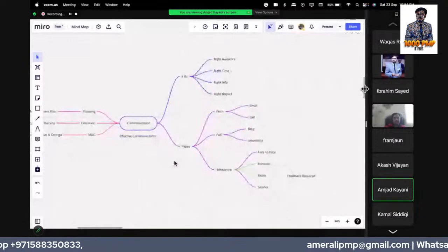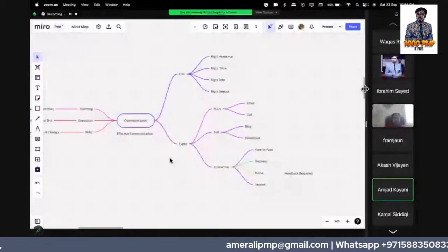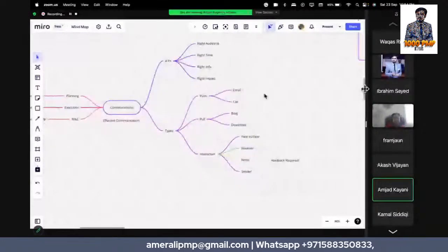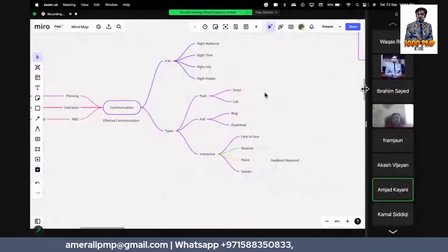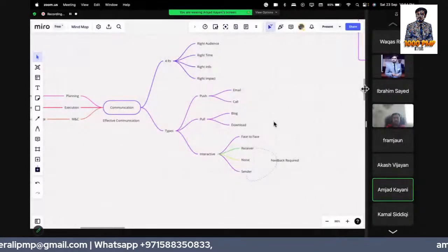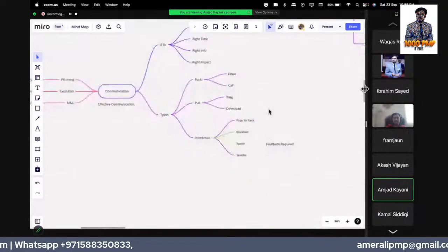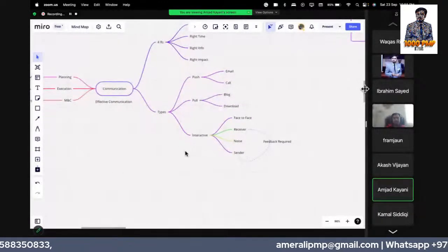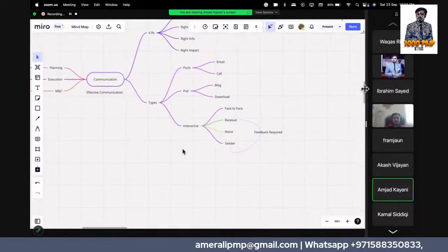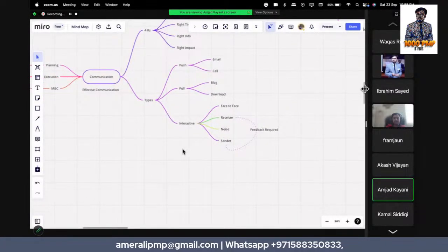Then there are types of communication. There are push, pull, and interactive. Email and call come under push communication. A blog, downloading something, or articles come under pull communication. And interactive communication has face-to-face conversations or webinars, seminars, etc.